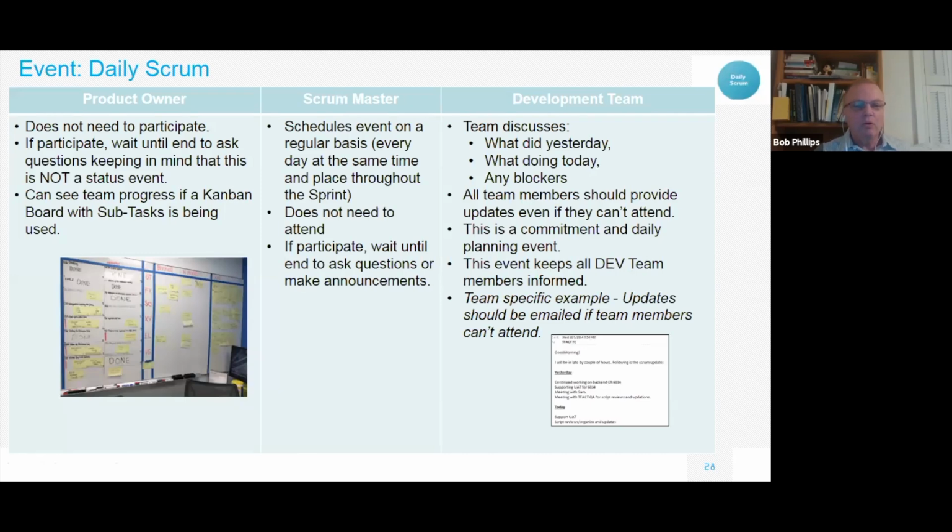They basically put all the items in the backlog in this section of the Kanban board. And then they put their initials in the middle. And as they picked up the items, each subtask has a number on it, so you could tie it back to the story. It's not ideal, but it worked great. And it also highlighted blocked items. It's just letting the team go. Just let them do it.